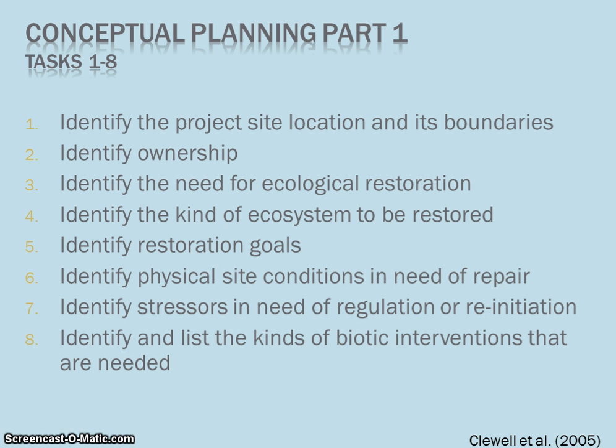Step 1, conceptual planning, includes considering feasibility, scope, and goals, and includes tasks 1 through 16. The first 8 tasks help gather basic site information such as location, ownership, and the like. This is basic information that is essential as the restoration project begins.